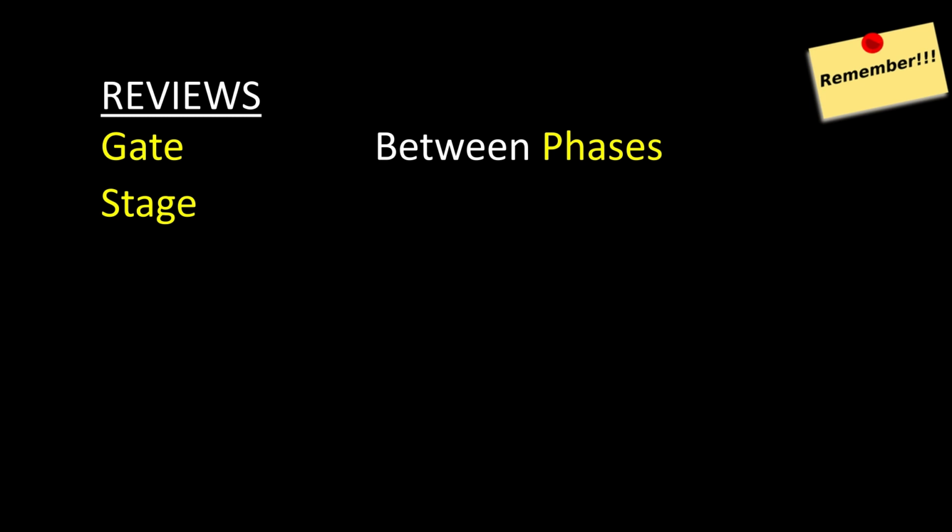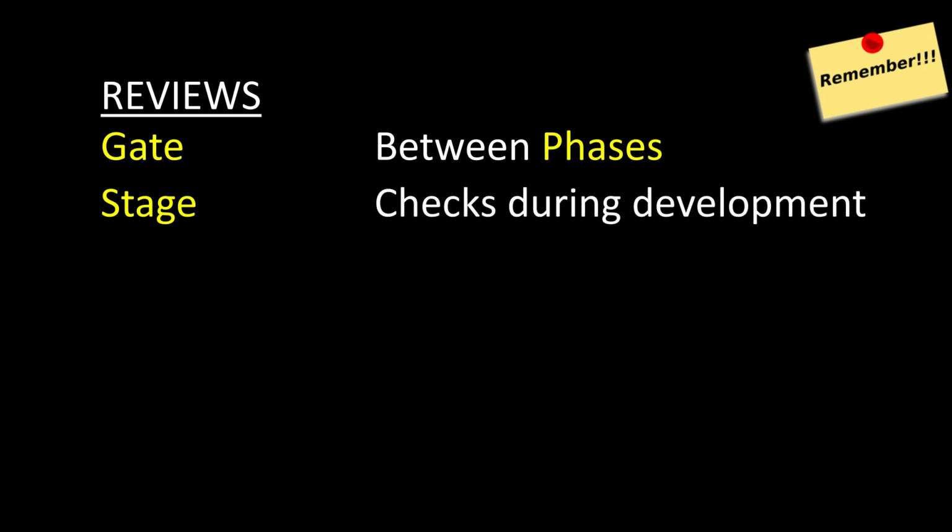If you're reporting into an external client, they may have a monthly meeting, and you might decide to have a stage review just before that meeting because it's a good time for you to stop, bring together all your information about your progress, where you are, what you've done, what's worked well, where you are falling behind, so that you can go into that meeting fully prepared and up to date with exactly where your project is with regards to its risk, its quality, its budget, its cost, its scope, etc. So stage reviews are checks during that development or deployment phase.